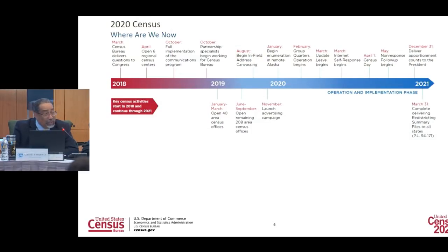We currently have leases awarded to all 40 of our Wave 1 ACOs and 75 of the 208 Wave 2 ACOs. Wave 1 offices are scheduled to open in January 2019, and Wave 2 is scheduled to open between June and September of 2019. As communications research is being completed this summer, we're working with our contractor and our contracting team to begin development of our media plans, our messaging, and creative treatments that lie at the heart of our advertising and promotional program. This will allow us to hit the ground running in October of